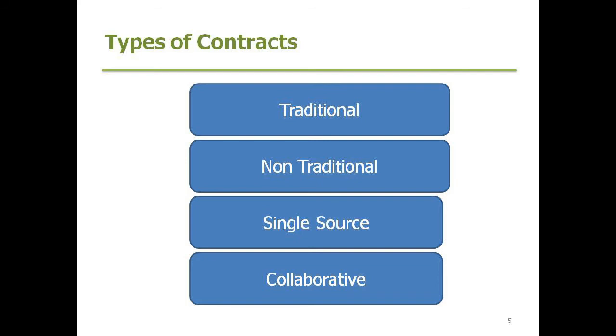So these single source or turnkey projects are often called BOOT, which is build, own, operate and transfer. And this is similar to D&C, but the builder also facilitates here the operation for a particular time afterwards. And the last form or type of contract is collaborative.